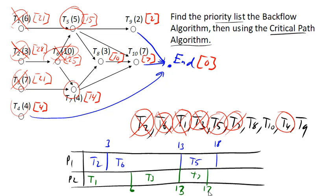So at time 17, then task 7 is going to get completed. This is not going to become ready yet, but task 4 is ready. So finally, we can start in on task 4, which will take me out to time 21.